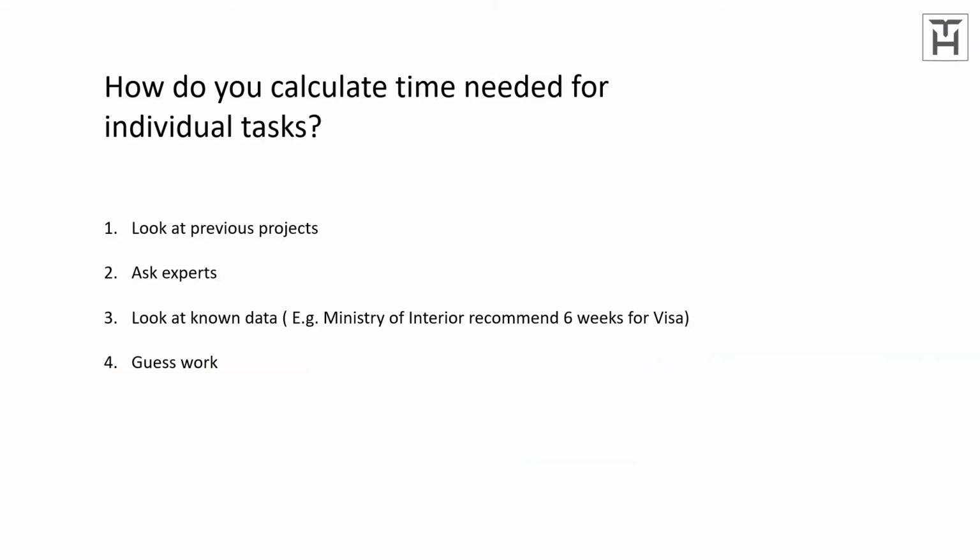So I'm often asked, how do I calculate the time needed for individual tasks? And it's not an exact science, to be honest, but I'll look at previous projects I've worked on, and I've worked in the Middle East before, I've worked on very similar projects, and I've worked in Jordan, so I have a fair idea how long some of these activities will take.